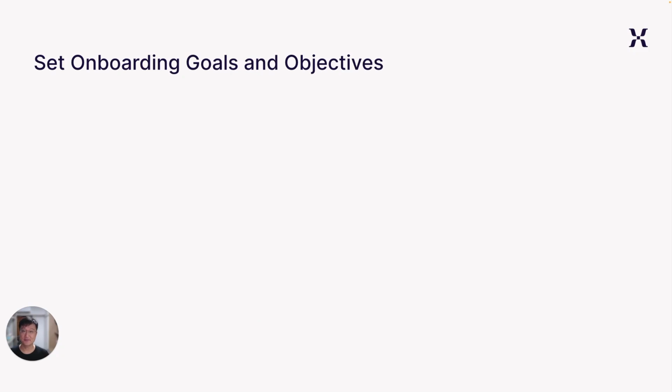As you plan for Mixpanel onboarding, here are some key pointers to help you succeed. First, set your timeline and when you plan to go live. Working backwards from this date, plan your sprints and scope your implementation accordingly.